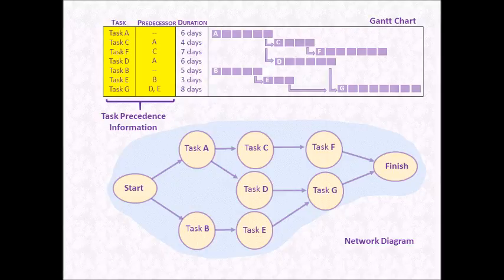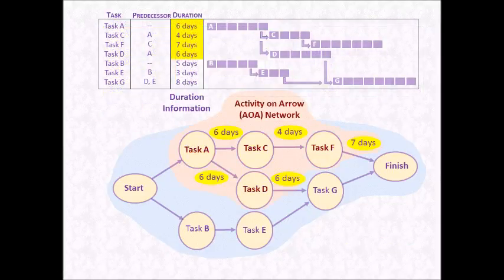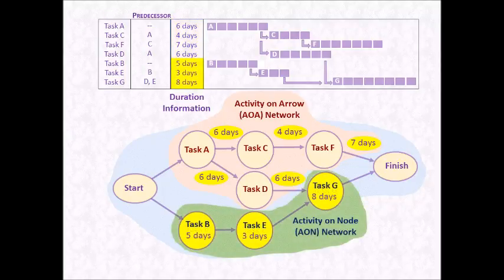We're going to take the task precedent information from our Gantt chart and create a very simple network diagram. We'll illustrate each task as a node and connect the nodes using the precedent information, as you can see here in this network diagram. This diagram doesn't tell us much more than the Gantt already told us, but it's a start. We can now add duration information onto our simple network diagram, and this is done one of two ways. We can either add the duration information onto the arrows that connect the various nodes — this is called Activity on Arrow, or AOA, network diagram. Alternatively, we can show the duration information within the node itself, as shown on the green part of the network diagram. This is called Activity on Node, or AON, network diagramming technique. As you can see, the information displayed is the same. It's just how you choose to display it.